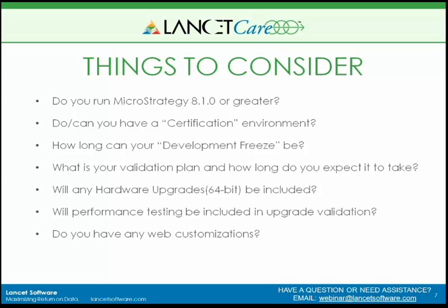Another consideration is, will performance testing be part of your upgrade plan? If you'll be doing performance testing and you're going to use that certification environment, then in order to do a valid performance test, you're going to want to create like-for-like hardware with your production environment. And maybe point that database at your stage or your production warehouse if possible. So that's something to consider when creating that certification environment.